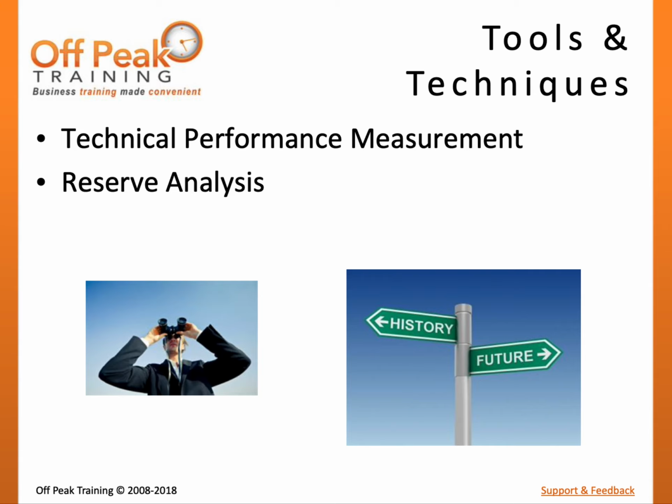In some cases, if a risk actualizes or is no longer relevant, it can be removed from the risk register. While risk reassessment should be a continuous practice that the team is doing on a day-to-day basis, formal reassessments can be scheduled as defined by the risk management plan.